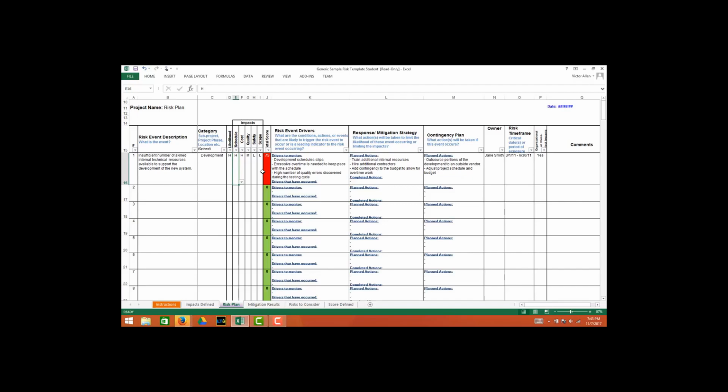You could fill up your tank the night before. However, what if somebody siphoned it out overnight? Or what if you had a leak in your tank, you didn't realize it, and it all leaked out? So there's lots of different things that you think you're eliminating the risk, but in fact you're not. You're just mitigating it. So the only way to truly eliminate a risk or avoid it is often just to remove it from scope, not do something.